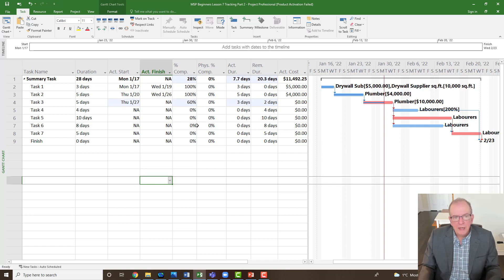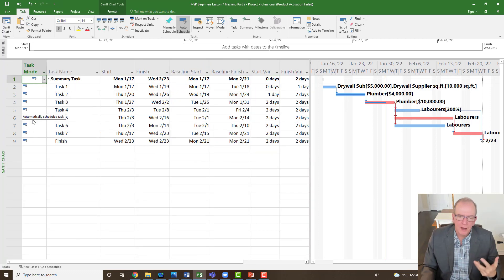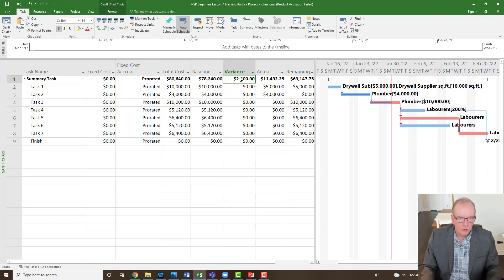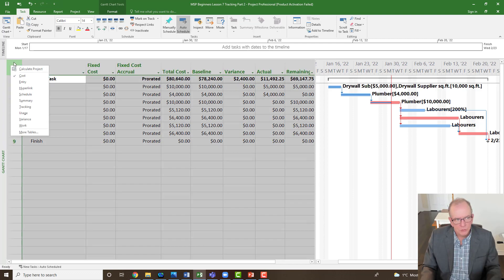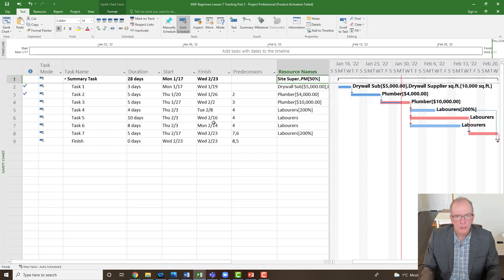Now that we've updated, we can check how far behind schedule we are. I click the square icon and go to the variance table — this is important for the next step of revising and recovery. We're two days behind schedule and cost-wise we're two thousand four hundred dollars over. The variable costs changed because it took longer — variable costs are those with an hourly rate assigned. If I go back to the entry view and pull to the right, I can see we've assigned the site super to the whole project and the project manager at fifty percent.